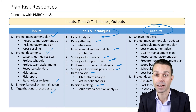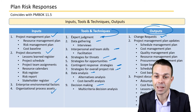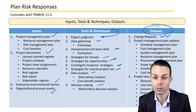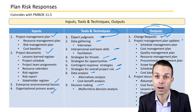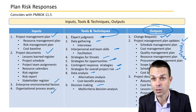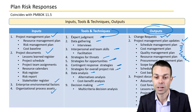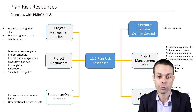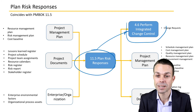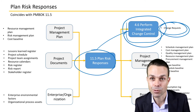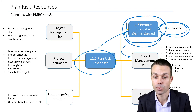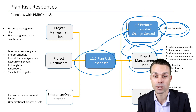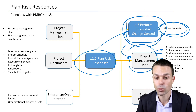Outputs from planning risk responses include change requests — if we need to make a change to a baselined document as a result of a risk or a mitigation. Project management plan updates may also be needed, as well as project documents updates where we might need to update things like costs, assumptions, or the project schedule.